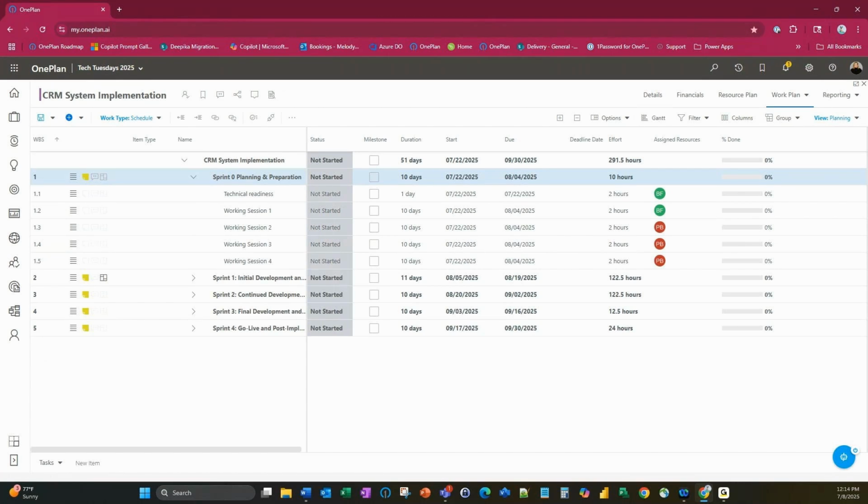Align on the minimal viable project, because as we all know, we have a certain amount of budget on a project, and so a certain amount of hours and effort associated to that. So great if we had an unlimited budget and we could do everything, but we definitely can't. So this is where you want to come in with your minimum valuable product, meaning those stories that you need to have to go live. Definitely want to make sure that all happens in sprint 0.